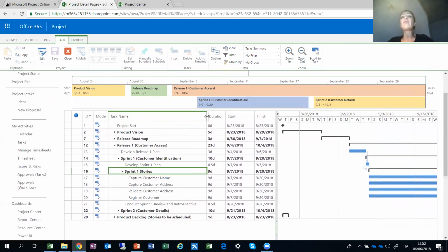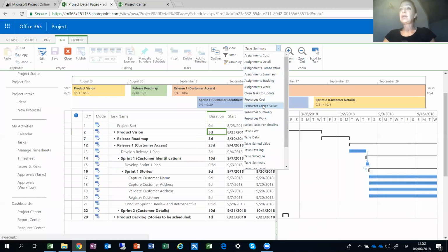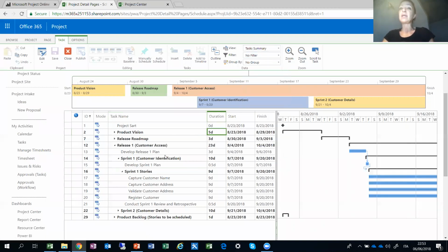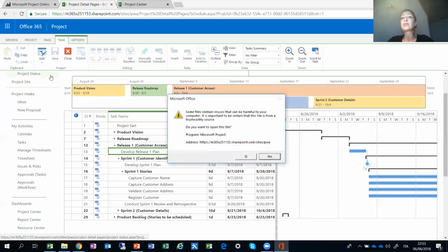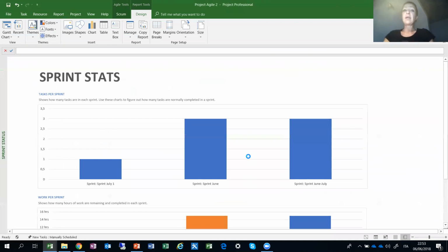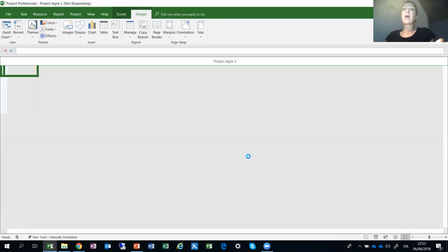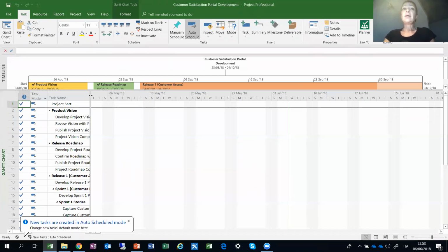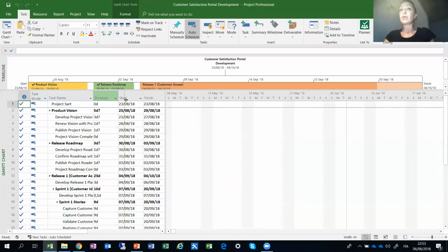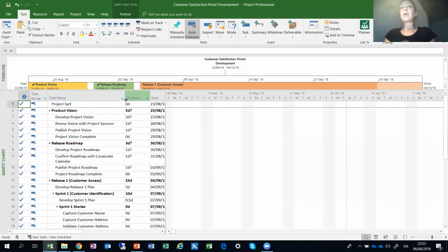Also in here, you can apply the logic of filtering by the Agile field so that you are able to provide an Agile view in Project Online directly in PWA, let's say, so in our project web app, so that you can concentrate on the activities managed using the Agile method directly in PWA with no need of using MS Project as a tool to report. Of course, MS Project Professional has to be utilized to be able to work with our opening project, work with our definition of the items, because you have the board of both Scrum and planning only in Project Client. The ability to work in Agile is provided only for Project Online, because these updates are delivered automatically through the